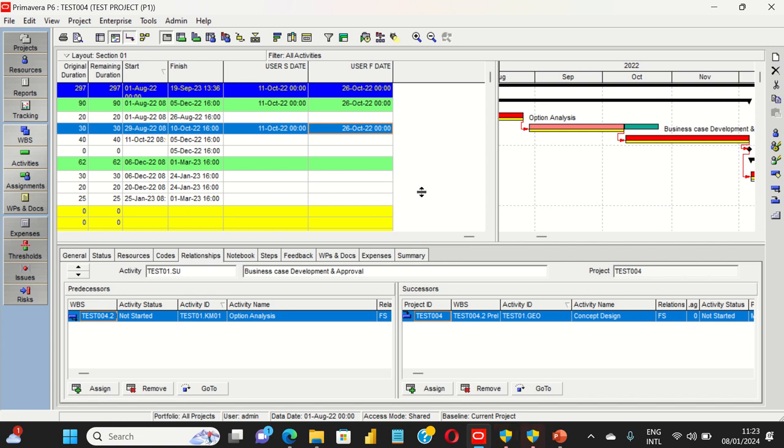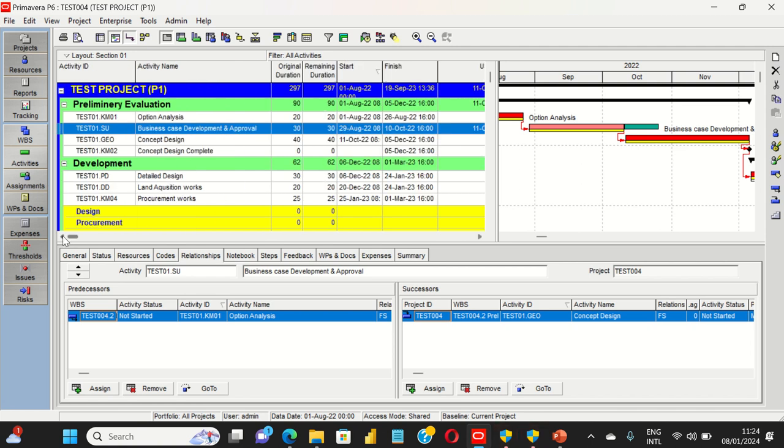So this is the same for the rest of the activities if you want to do that. If you have a big project with more than 500,000 activities, it will be really difficult to do for all of the activities, but it's important to do your initial risk assessments before doing this, to get a feel for what the risk allowances are for each activity and what risks are involved. Then you can do the steps as shown in this video. It's very simple, and it shows a risk allowance in a different color for each and every activity.